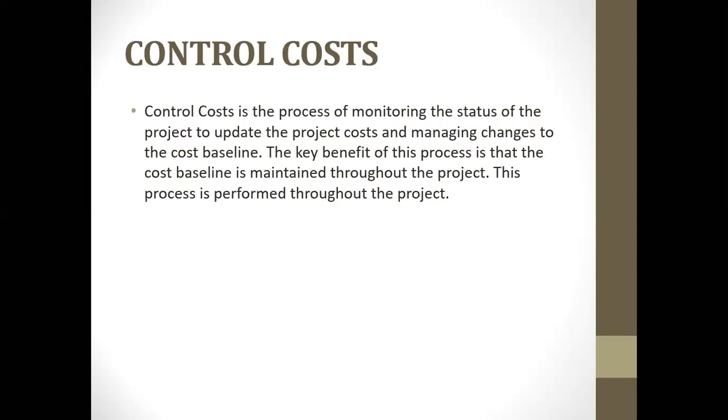And now there are project contingencies. And let's assume that the project is a firm fixed price or lump sum contract. My brother, my sister, you've entered into serious trouble. You have to go and produce the remaining 100 million to finish the project, or you have to go and sell whatever thing you used the 100 million to buy to generate the money to finish the project. You don't spend project money until the project is over. You don't calculate your profit until the actual cost of the project has been measured and ascertained.